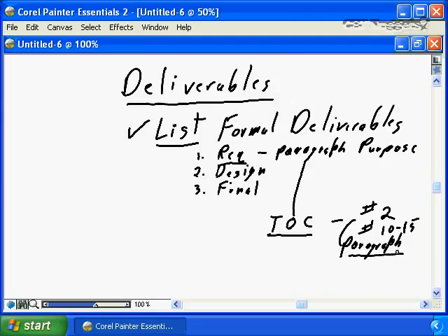But for a very large project that involves hundreds of people and years' worth of effort, defining the deliverables at this level of detail is absolutely essential to ensuring that you are able to understand, able to manage, and able to deliver to the business's expectations. So again, level set, define the deliverables at the appropriate level of detail based on the size and complexity of your project. But by all means, define the deliverables. It's part of the scope definition.